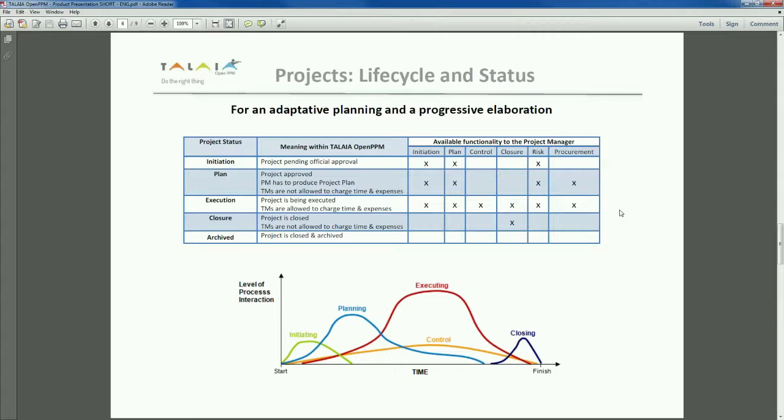So what we advise people is that you just create a project where people can report the number of hours, and you can as well split it by activity. It depends. It can be specific planning, it can be pre-sales, it can be any activity. So you can have this split within the project. So at the end of the year, my people spent, I don't know, 500 hours on planning projects. Others have spent 1,000 hours on pre-sales activities, etc. So by doing this you have the ability to get the information and know how much time has been spent on those kinds of activity. Okay.